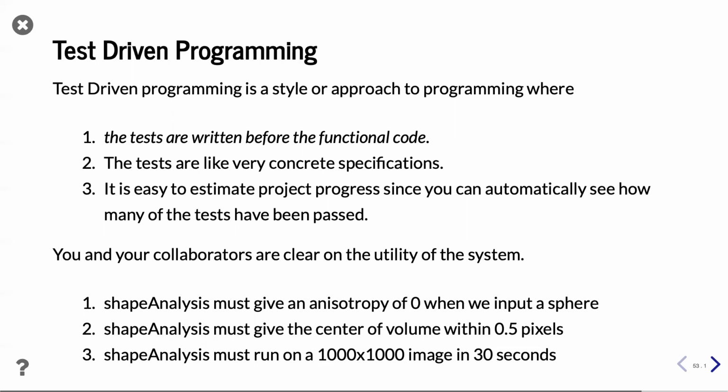And in principle, what these tests are is a coded version of the requirements of the code. And then you can see also how far you have progressed in your development by just running the tests. If test 1 is fixed, then you are at 10%. If test 5 is fixed, then you are at 50%, etc. So that gives also you a progress indicator.